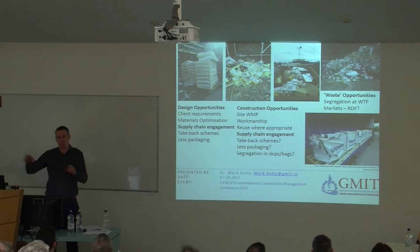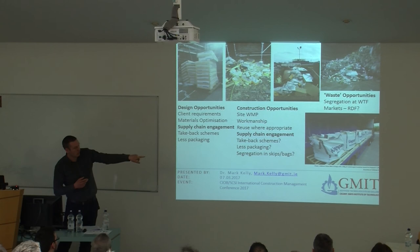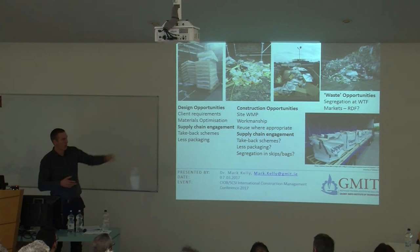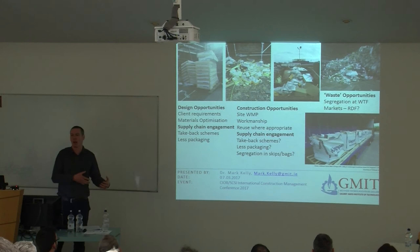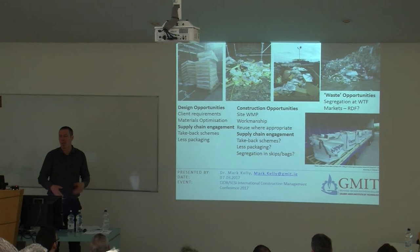The interesting thing is it can be done. So Kingspan have done this, not blaming Kingspan if there's anyone here from Kingspan, but they have done it with Wilmot Dixon as a case study in the UK. But it was done in the tender stage, in the very, very early stages. They said, we're buying X amounts of insulation off you for this large building as part of the contract. We want to have a take-back scheme. And they agreed. And you go to any Kingspan website, there it is, promoted.